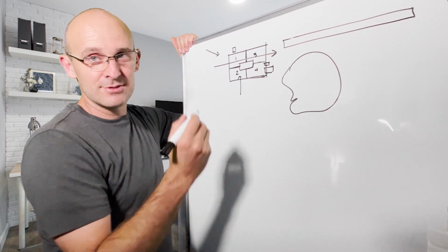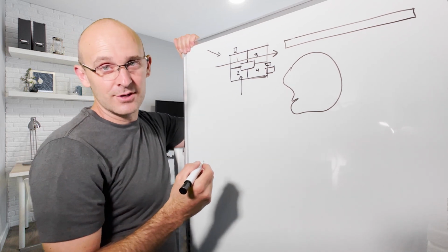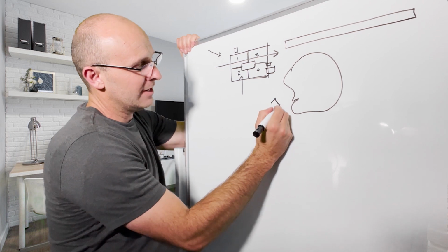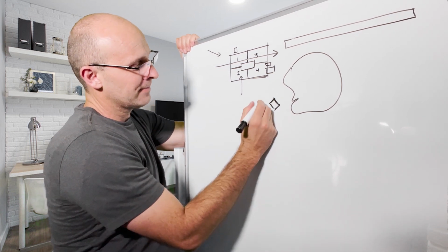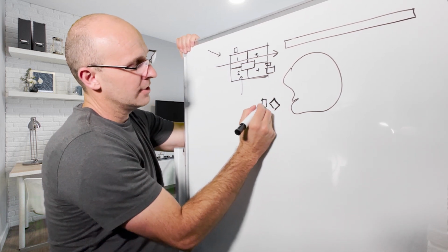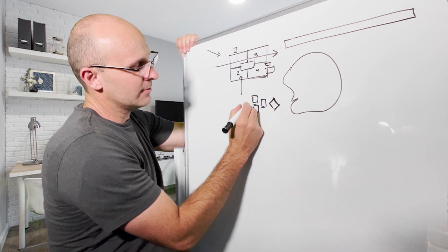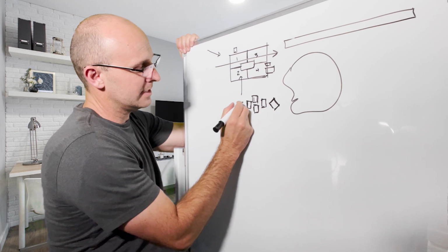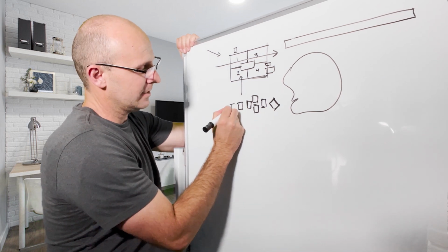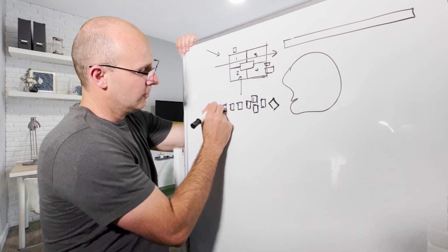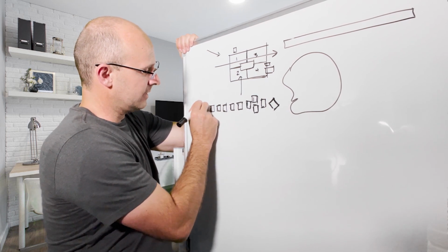Oh, no. I'm going to use terminology that we're used to in the U.S. We're used to the Last Planner system by this time. If we have milestones, pull planning is a system where we work backwards with stickies, with commitments in the right sequence. And there's a really neat way to do this, and I can show you this one of these days, but we create sequences, right? And in these sequences, it's the activities and what some people might call work steps, right?